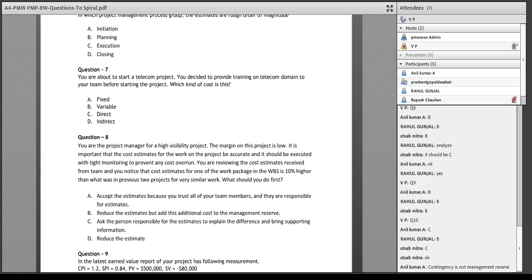You may not accommodate this in your project. Against the risk which the project team or the stakeholders couldn't identify, or such disaster-type risk, the management reserve is kept. Contingency reserve is for the mitigation or the response plan of the risks which are identified. Some risk mitigation provisions which you have made are part of the project budget, but not the management reserve.